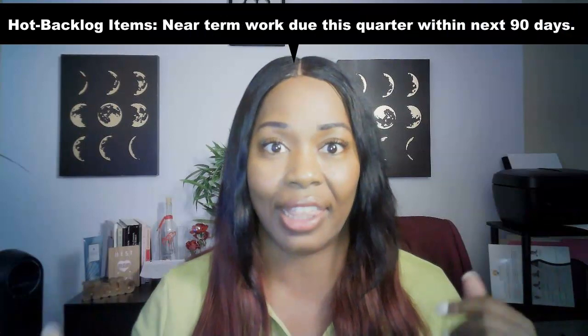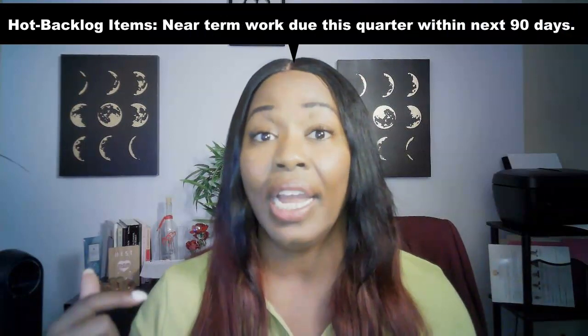All right, next we are going to go into what I call the hot items. So the squad's or the team's current workload, those items, the work that is really due now between a 30 and 90-day period. What are we on the hook for delivering and producing in the next 90 days between now and a 90-day period? I call this hot items, right? Or kind of the hot backlog, things that we're working on. So what have we already committed to? Is there anything in that list that is at risk? What of that list are we dependent on with other teams or outside vendors or some business partner? So find out completely, be hyper curious, lean in, deep dive, and ask to understand.